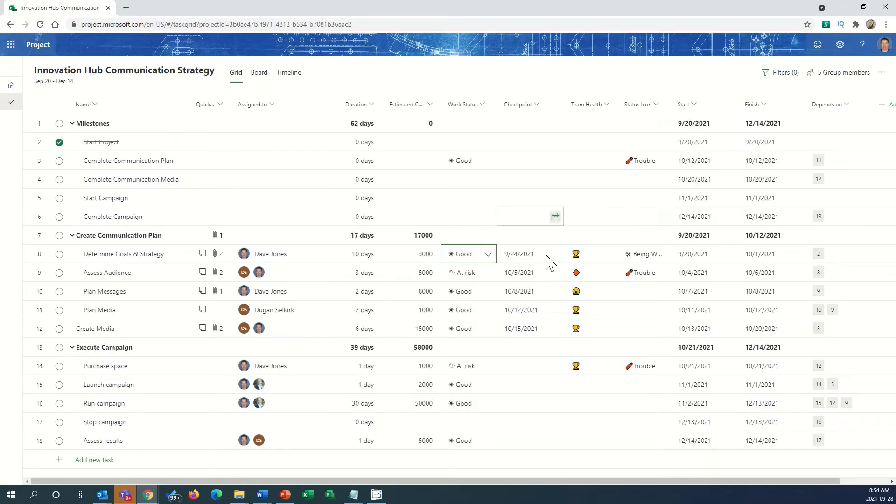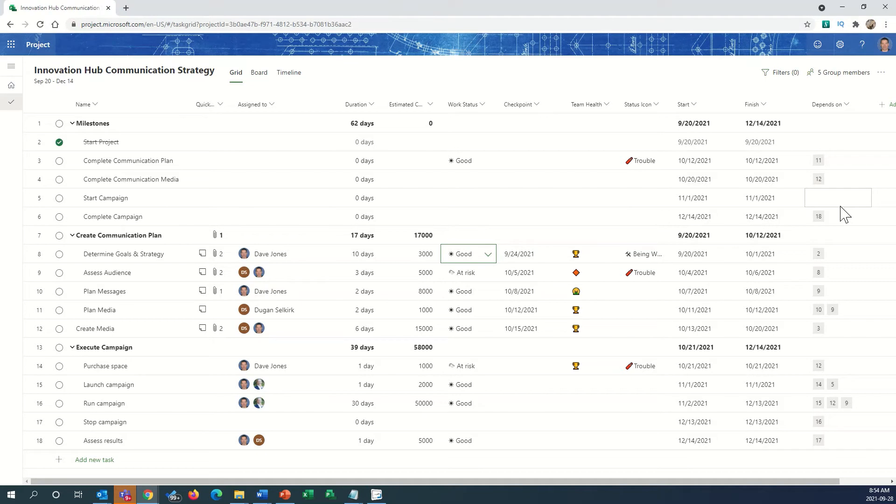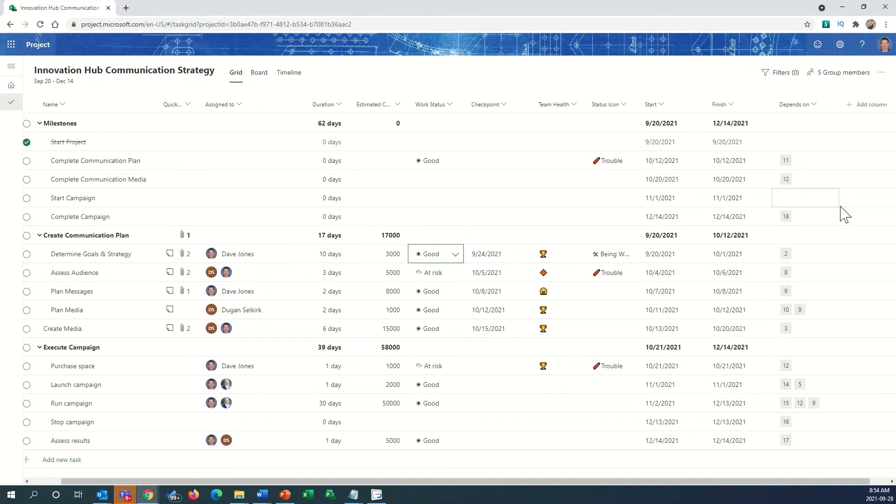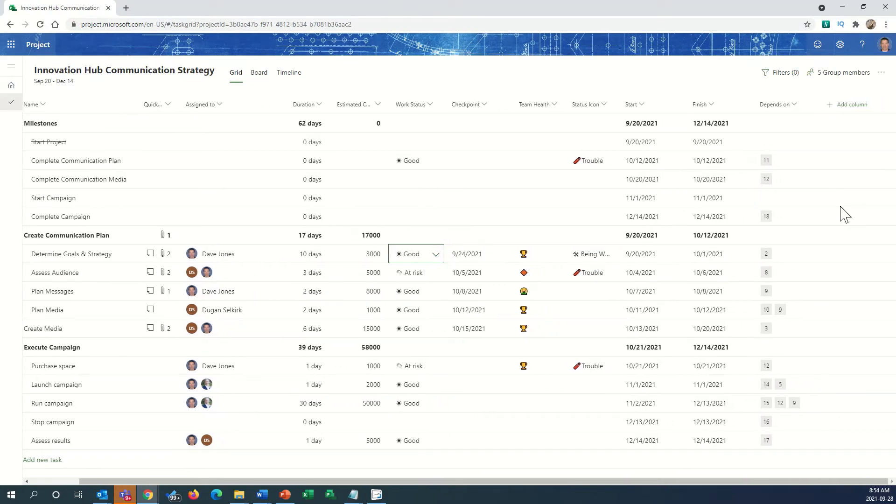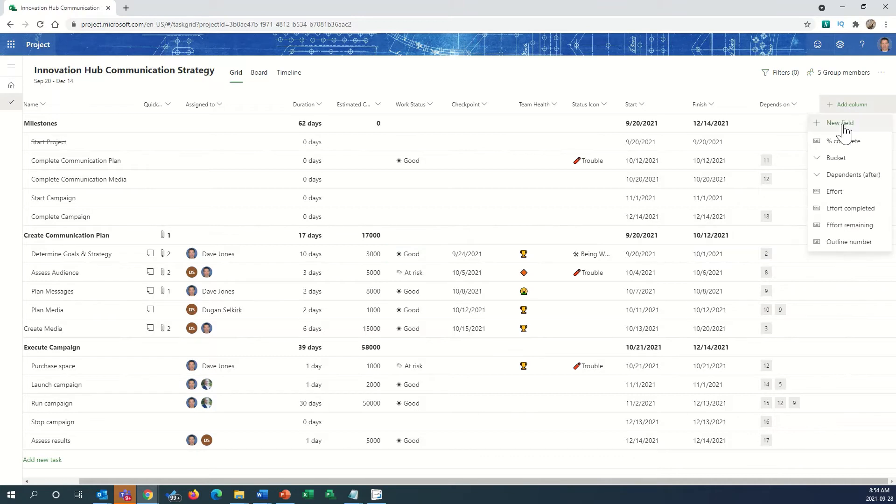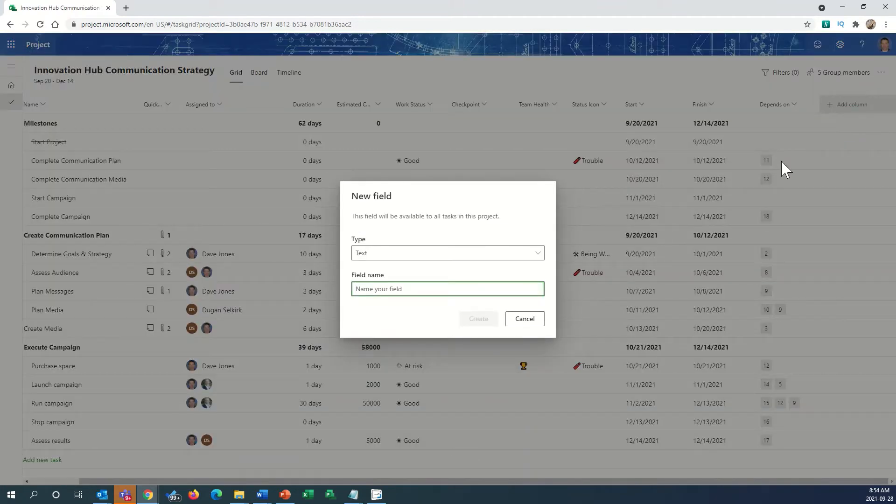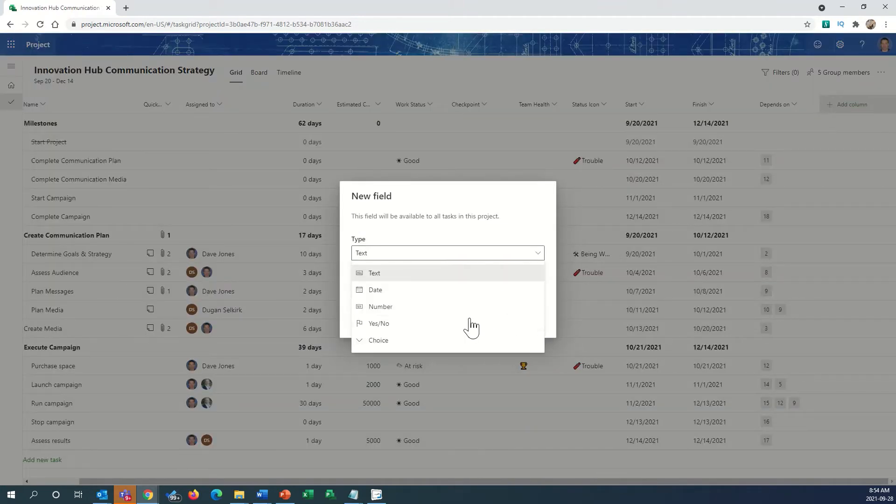Here we are back in project. We know that we want to set up an indicator to show a red flag if our finish variance is greater than or equal to 5 days. Let's start by inserting a new column here, where we hit add column. We pick new field at this point, and from this pull-down box, we're going to select choice.